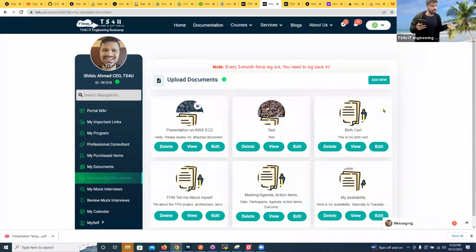make sure in the planning meeting, good user stories are ready for estimation. Priority user stories ready for estimation. The planning meeting normally takes 60 minutes. Some teams can take 90 minutes. Mix and match based on the situation. That's fine. So now your team will be estimating based on the discussion. Each user story will be read, understood, clarified, with questions asked, and then if everybody is in agreement, they give a time. That time is 2 days.